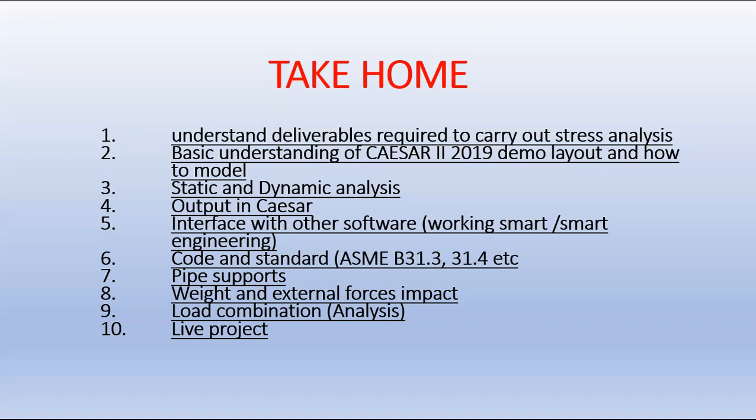When you now do that on a live project, it's very good because you understand exactly what is happening by the time you are doing your model review, even a constructability review. All those things are very key, and you have to bear that in mind. When you are doing a constructability review, you look from the construction side, when they are doing construction, you see the hydro test, even the temporary supports that sometimes they add just to install certain things, and even the weld point. Everything is very key to stress.